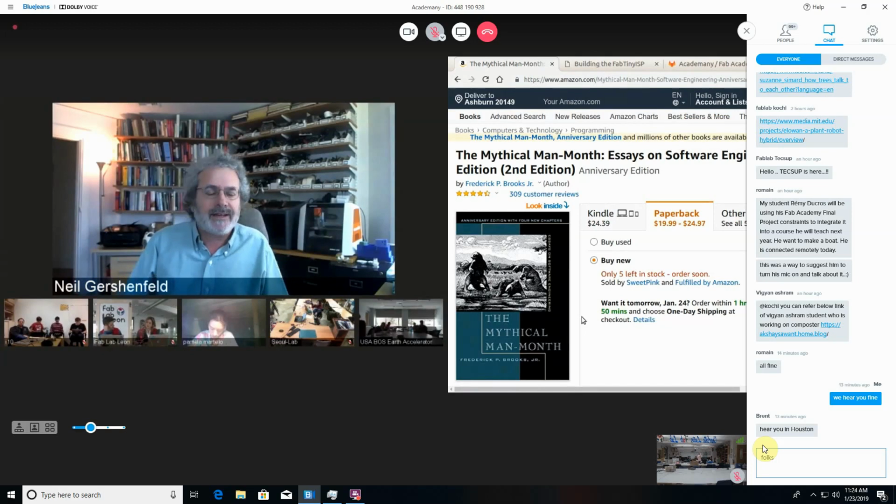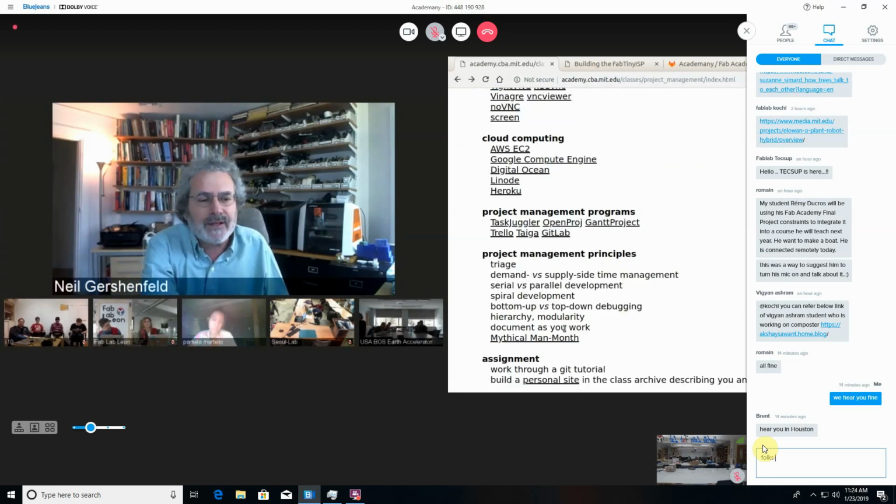Like, one of the principles from this is, a pregnancy takes 9 months no matter how many women you assign to it. Some tasks have a set amount of time they require, and you have to design around that time rather than the effort you put into it. There's a bunch of good insights like that into project management.